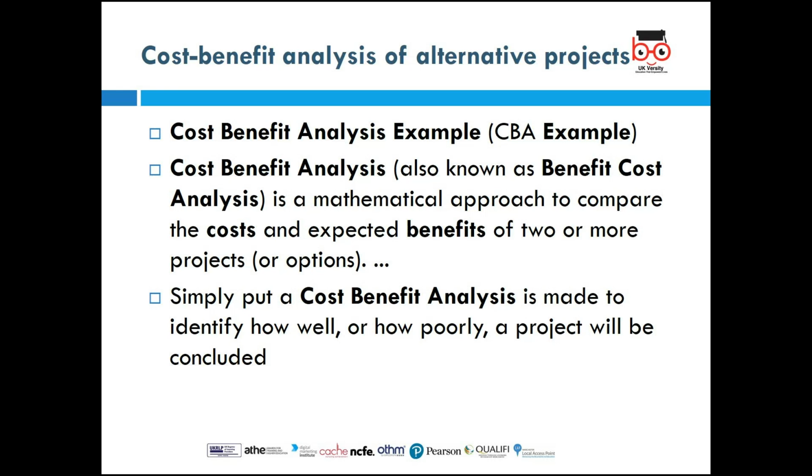So, for example, if you decide that we want to build our own canteen, but the canteen is going to be very expensive in terms of construction, we haven't got money, or if you've got money, the money can be used to do something else. In terms of cost-benefit analysis, it would be quite cheaper if we outsource the catering company, who prepare their own food, drive in their van, come and deliver the food. They finish eating, they take everything away, go and wash it. So if we feel that in terms of cost-benefit analysis it's going to be cheaper for the organization to go that route, then of course we go down that route.